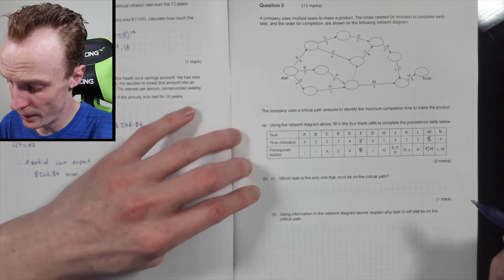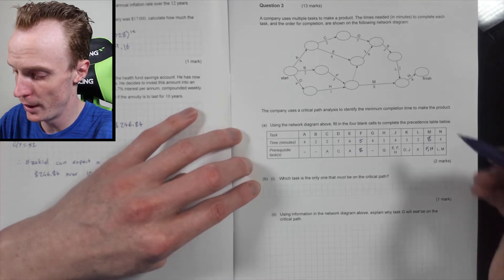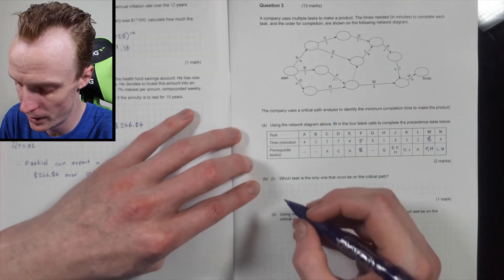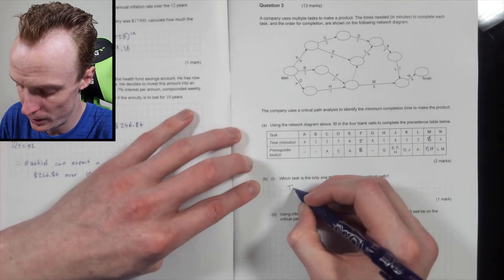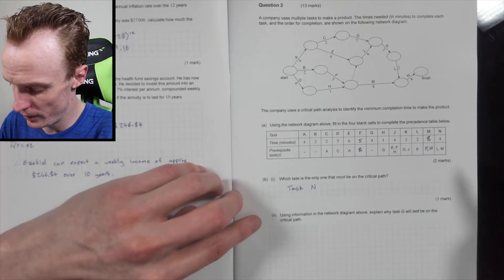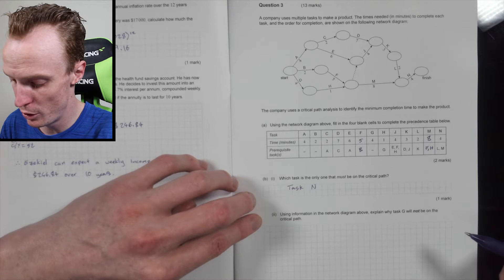Which task is the only one that must be on the critical path? Well, that has to be task N, because task N has to be done to complete it and it hasn't got any other alternative pathway. So this will just be task N. Using the information on the network diagram below, explain why task G will not be on the critical path.